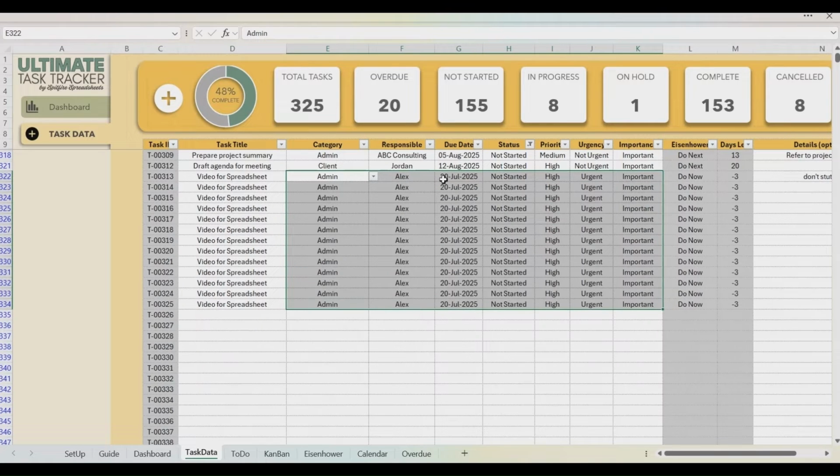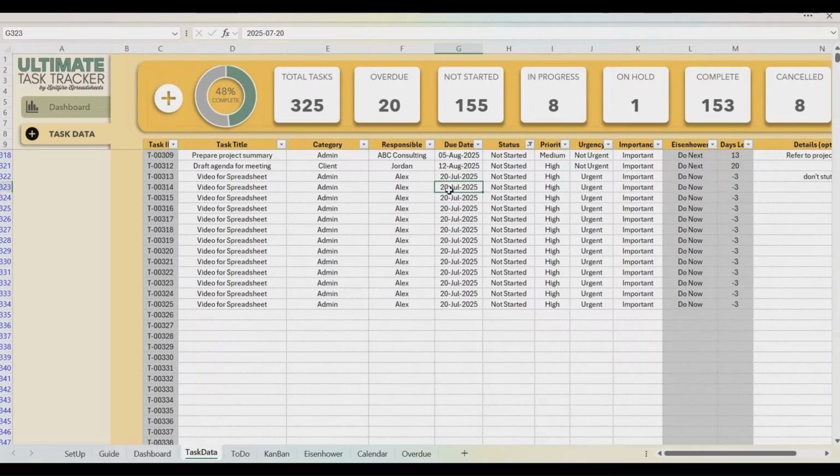and that's not what I want. So if you have a little bit of Excel savvy, you can use formulas here too. So let's say I want to do one every single week. So I can say starting on 20th here, which was when my first one was, plus 7 days, and drag that down. Let the formulas update, and there you go. I have tasks that are all the same, entered into the spreadsheet in very short order, and I know all of these dates are spread out evenly as I want them.